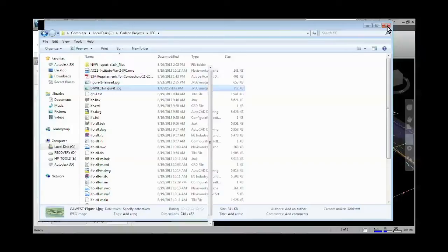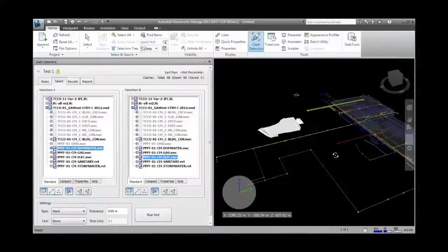And the idea was that the contractor had to use BIM, and they had to find their own conflicts before any blades touched the ground. And so what the client is trying to do is eliminate change orders. Because if the contractor does not use BIM to find their conflicts before they go to construction, they will eat the change orders. So this is a massive change occurring in our industry right now where they're trying to get rid of change orders. And of course, you know how lucrative they can be. So some clients now are getting into BIM.